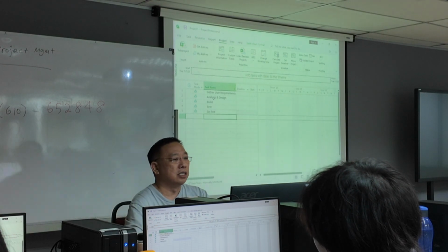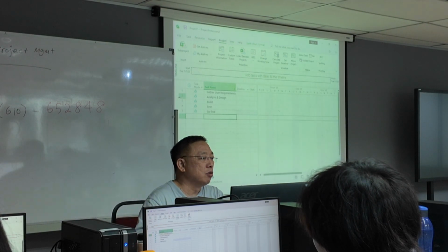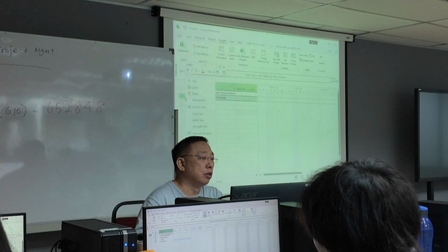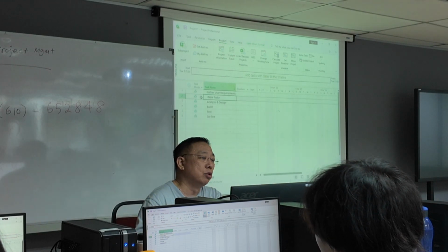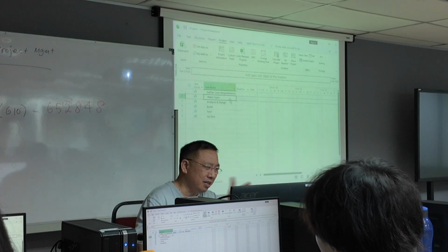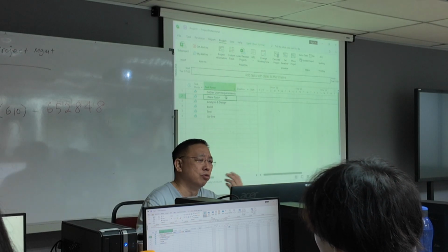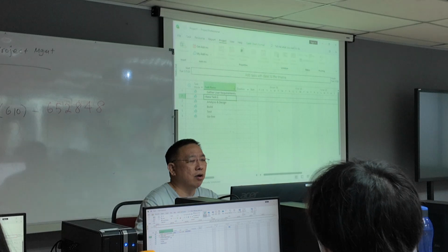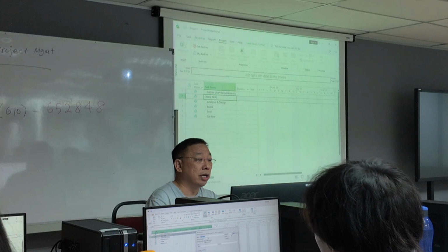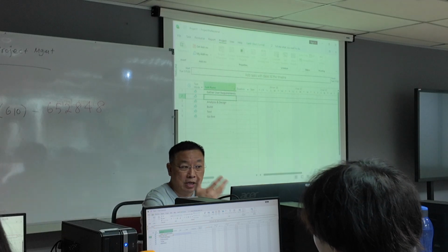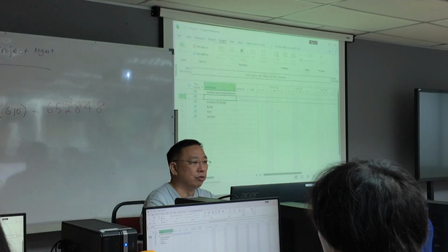The way to insert a sub-task is to right mouse click in between those two and do an insert task. If you insert a task between 1 and 2, it will generate a default value of new task. Let me start entering the sub-tasks under gather user requirements. You can follow along, or you can watch, up to you.